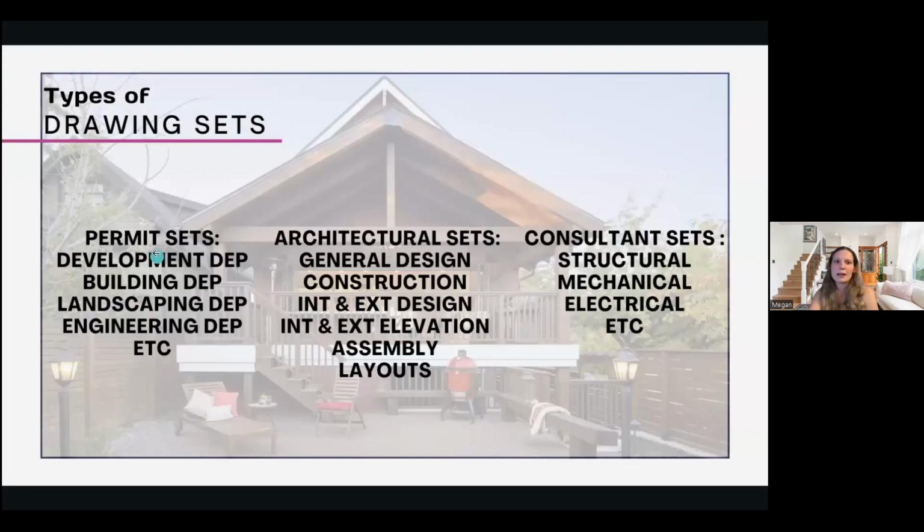So then going into the last thing that we're going to go over today in general, the information that ends up on different drawing sets. Permit sets are things that you're submitting to the city. That includes your development department information, which will have to do with if you're submitting for a development permit. That's usually if you're changing the use of your property in some kind of way.